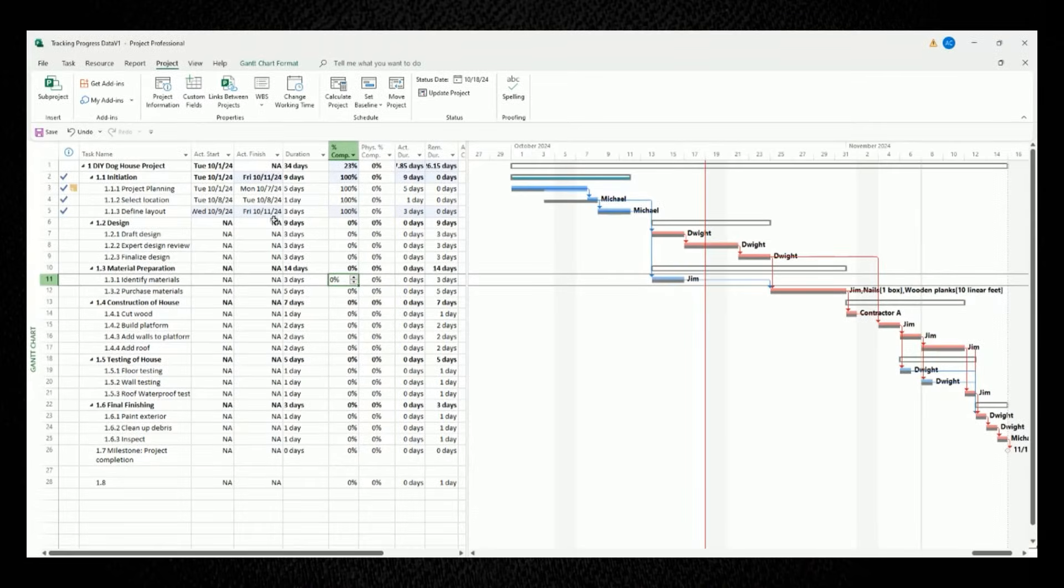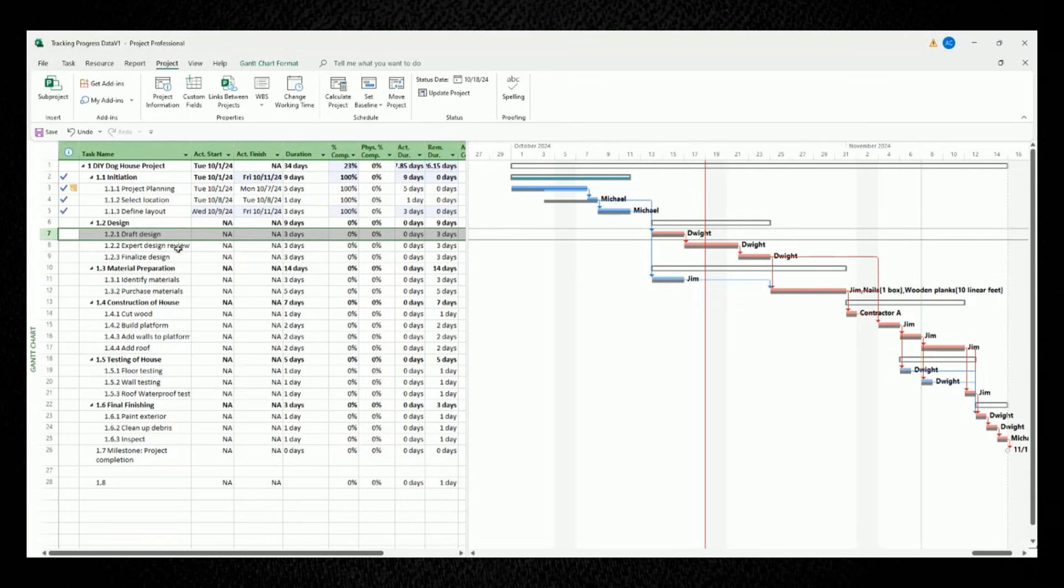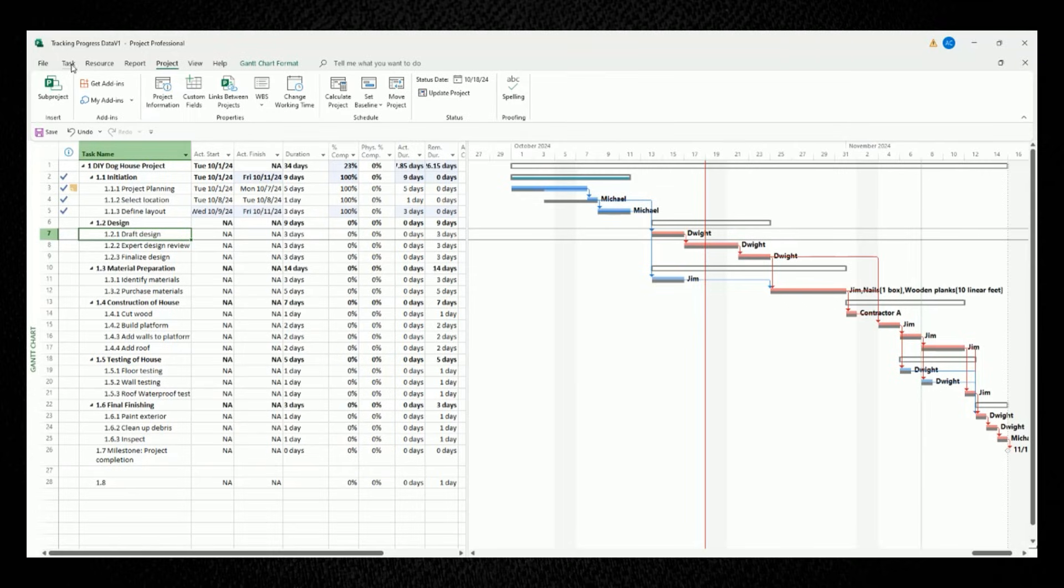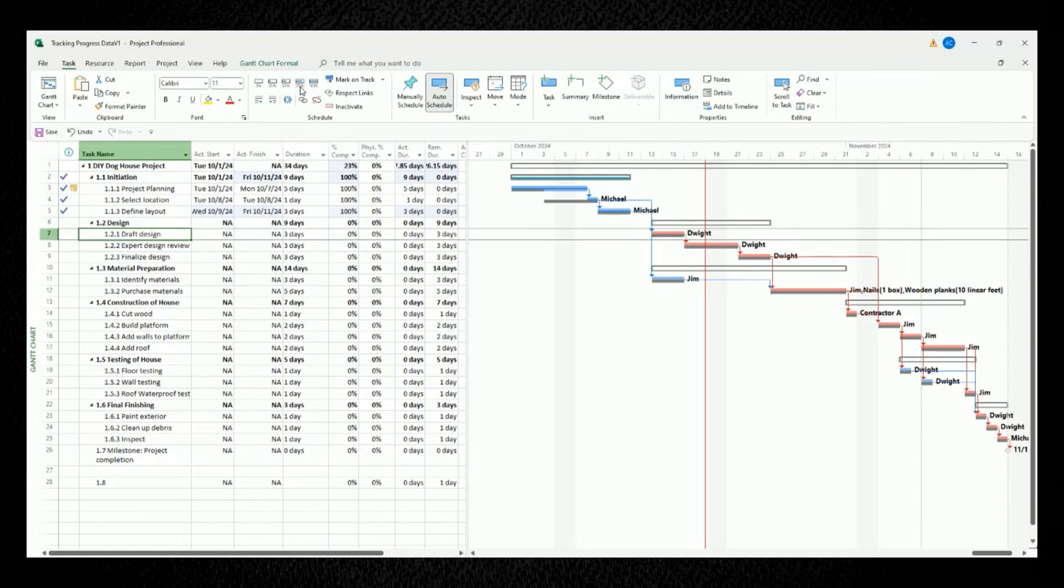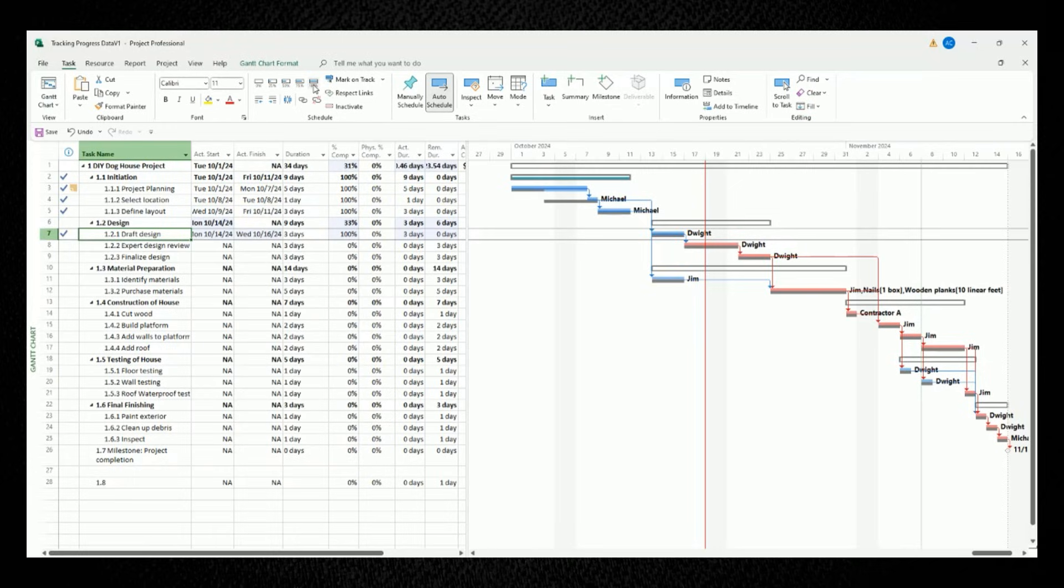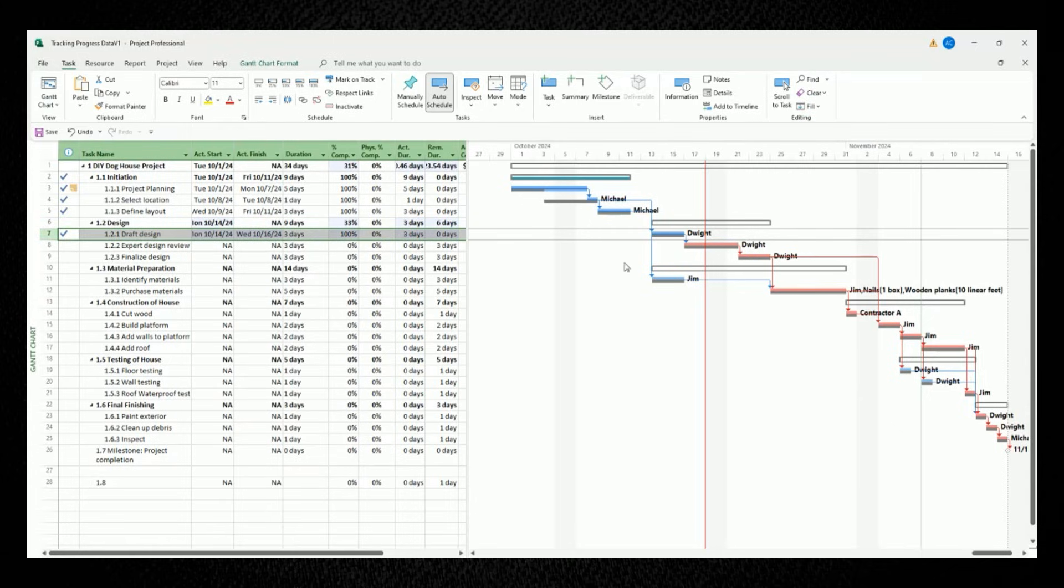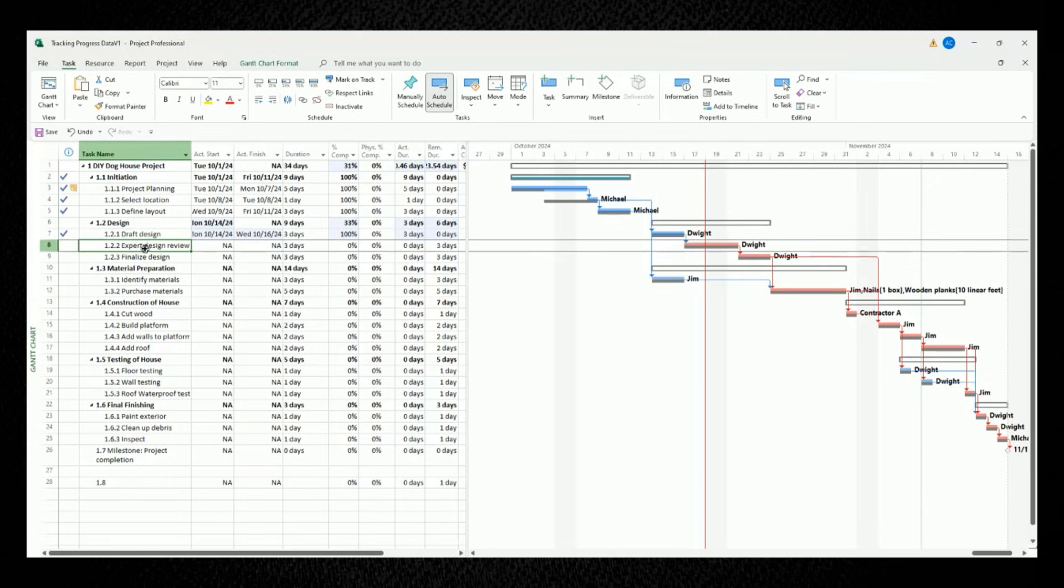For our first task of draft design, let's say that it's 100% completed. The very fast and easy way to update its progress is go to the task tab and then under the schedule section, you'll see different buttons to mark different percentages completed. You have 0%, 25%, 50%, 75%, and finally 100% completed. So let's left click the button for 100% completed. When we do that, the fields will update accordingly and the task bar in the Gantt chart will turn a blue color to show that it's completed.